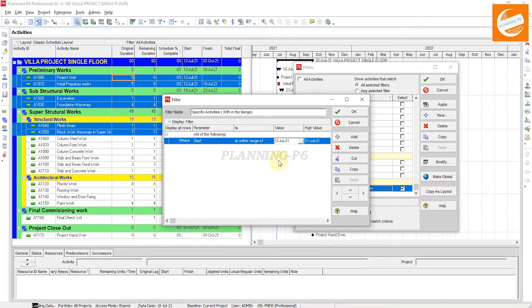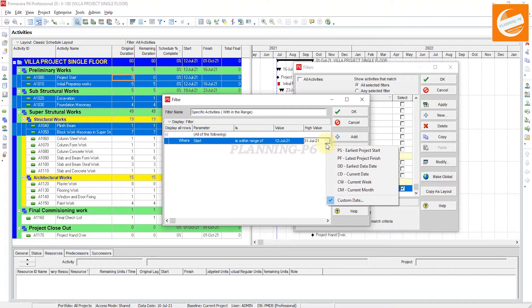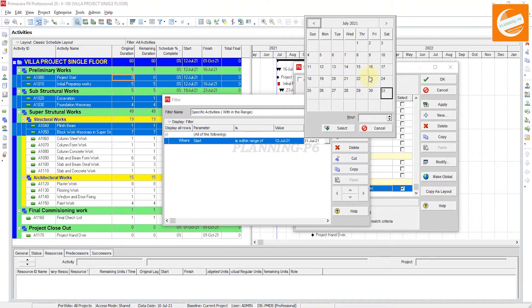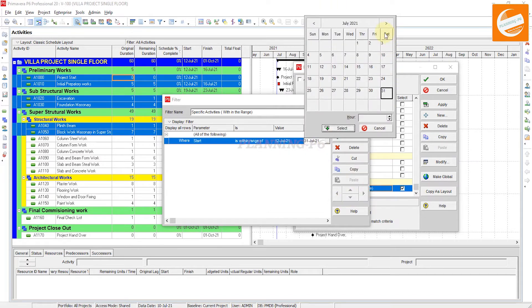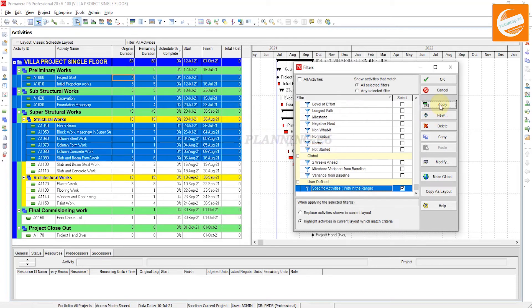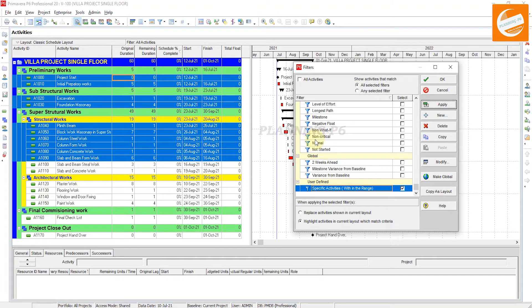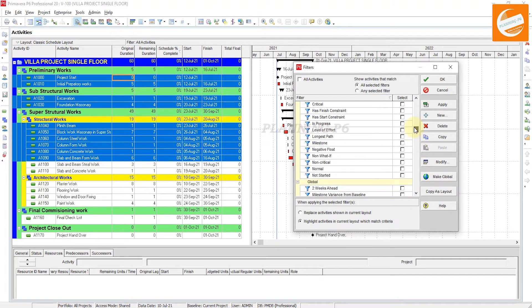After modifying, you can change the dates. For example, modify the range to 31st of July and then set the custom date to 10th of August. Select OK and apply. Now you can see the activities are highlighted in blue. This is one method of how you can see your activity highlights within specific time periods.